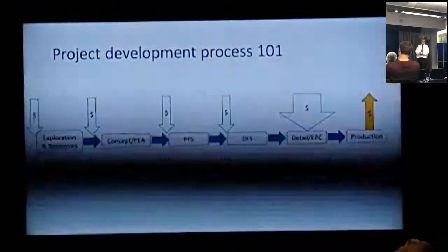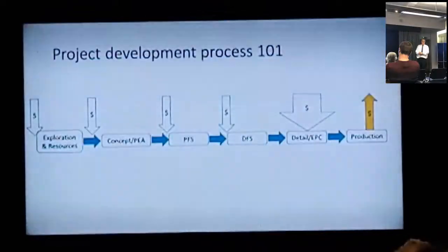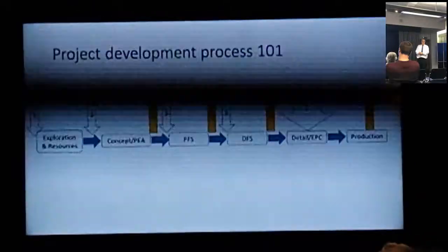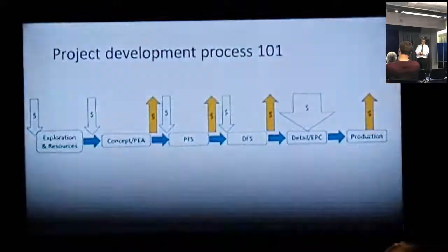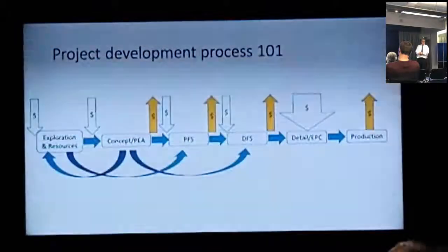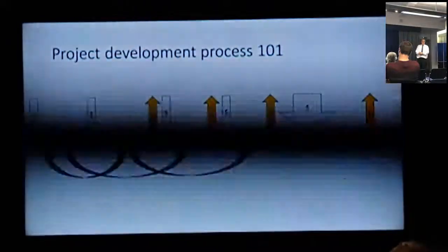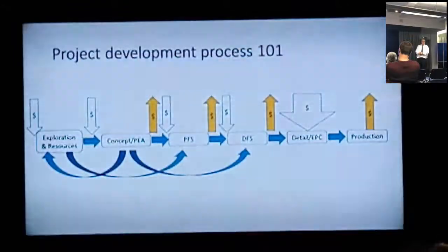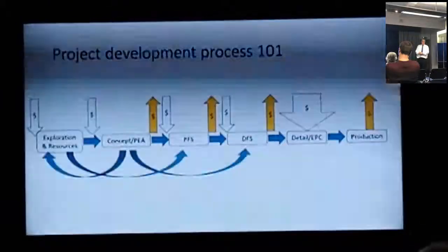At each step of those development processes, money is required. And hopefully at the end somebody gets a return — but some people get a return by selling a project at concept level or at any point during that process. So there's money going in throughout. And of course there are feedback loops. Often at concept level, not enough work has been done on the exploration side and resources aren't high enough to support the project, so there's a feedback loop — go back to the beginning and do more work.